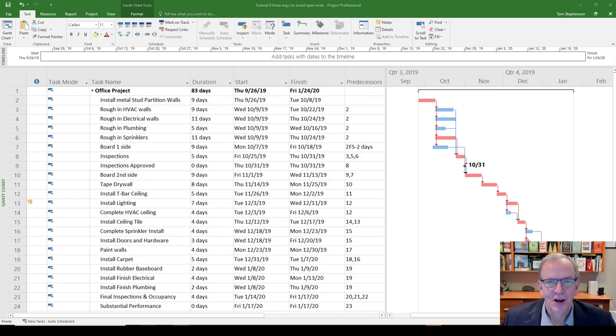and use MS Project. One of the common mistakes that people make once they get used to setting up their activities and their predecessors and their successors and drawing out the project is they don't consider that everything that needs to be done in your project needs to be linked to something. That means it should have a successor, should have a predecessor, unless it's the first activity. The first activity doesn't need a predecessor, and the last activity doesn't need a successor.